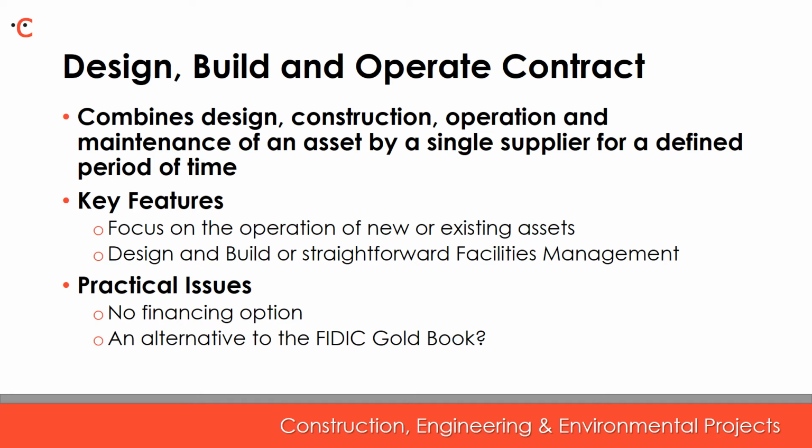I think the spirit of this is very much in line with the industry move to embrace soft landings, both by government projects and indeed private projects, whereby designers and constructors remain involved with projects at least 3 years after the completion of construction to ensure a smoother handover to the operator, and indeed to ensure that the operator's requirements are taken into account much earlier in the initial design process than is typically the case hitherto.